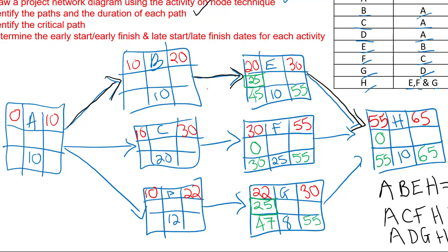So working backwards across the top, again here we're going to take 45 backwards. Here we take 30, and for D we take 47. Up on B, 10 from 45 leaves 35. 30 take 20 equals 10. And 47 take 12 equals 35.